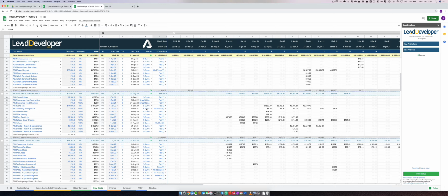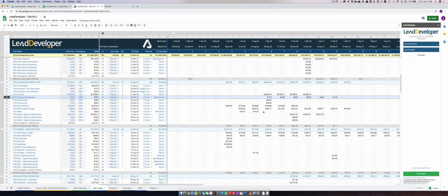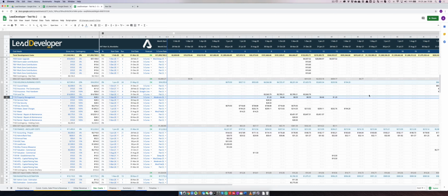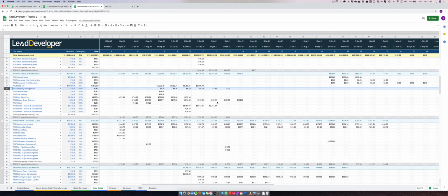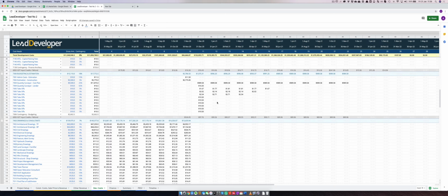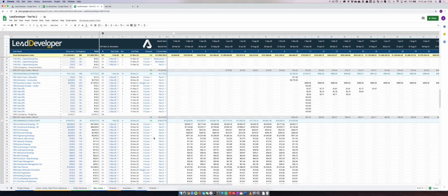I've shown examples where you've got an S curve, but a moderate one. And if you look at the costs over here, you'll see they start with 1.2 because we are only distributing about $10 across 6 months in an S curve, which is moderately steep. So we'll get into these in a second, but let me just scroll. Let me even close this section out and show you what this would look like. So we are now looking at our cash flow, and we know that this is where the money is coming in. So we've got our drawings and consultants, and they start in March and they go all the way just before the construction starts.